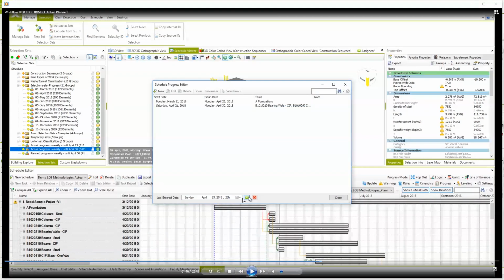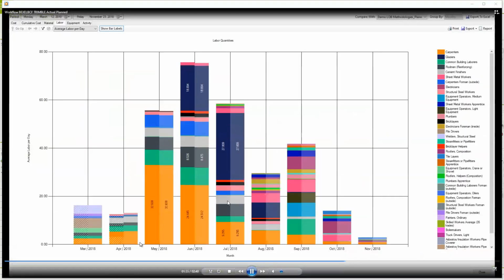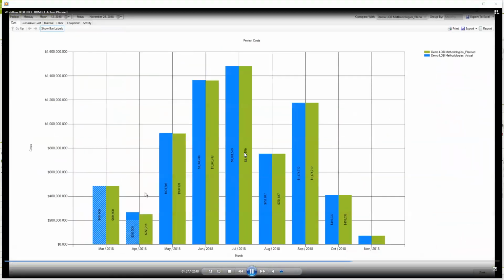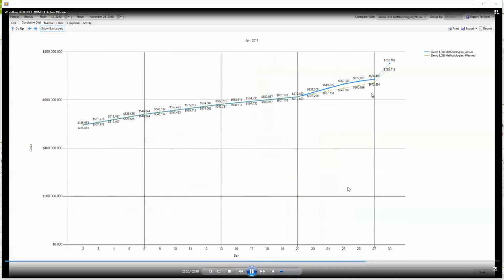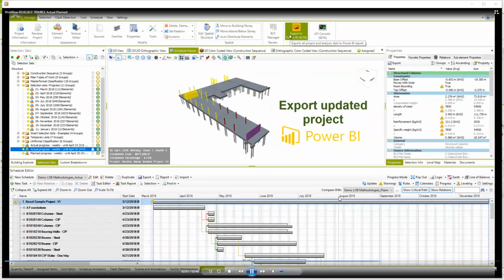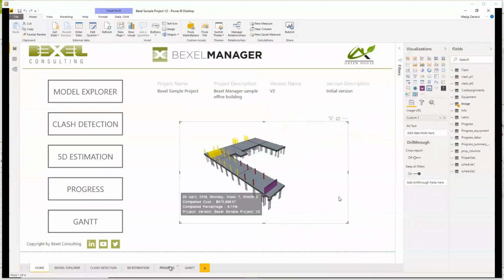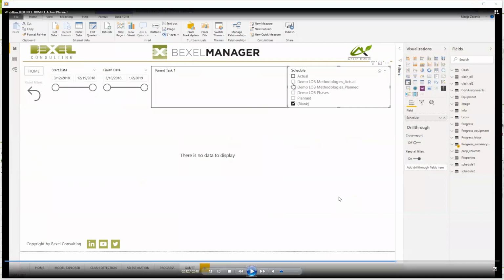And you just have to provide the date or time when you entered these progress. And by doing that, the system automatically recalculates the schedule, and according to your progress entry, it calculates the price and duration of your actual schedule. This is a brief explanation of how you can collaborate with additional platforms, and of course, all this information